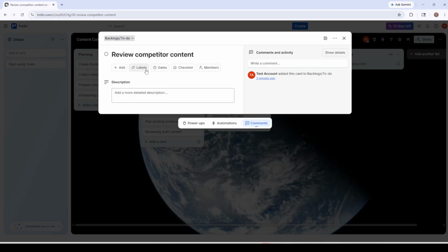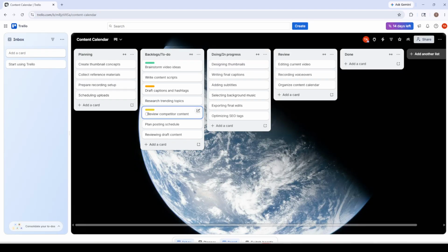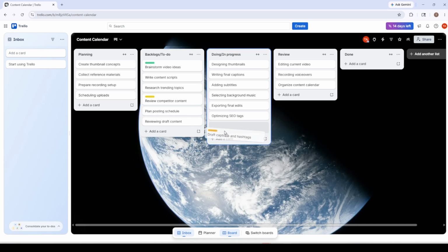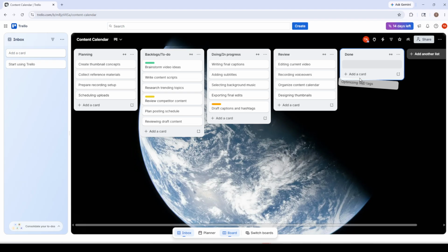When your setup is in place, start the Kanban flow. Pull work from left to right, choosing the next highest priority card from your backlog. Limit your work in progress by keeping only a few cards in the doing column at any time. Finishing what's started is more efficient than starting more. Drag cards across the board as they move through each stage, and celebrate the win by moving them to done. This rhythm keeps work focused, visible, and finish-oriented.